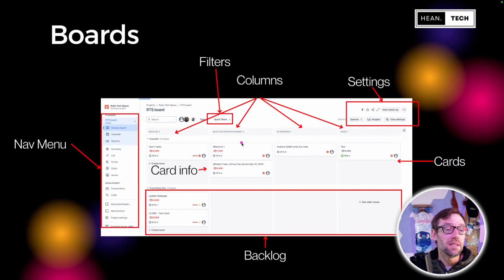Now, depending on how my team uses the board, it can be set up for Kanban, which helps us focus our work. And if you all recall from our first session, our team might have a rule: you only get one item in progress. And when I see more than one item, I'm going to go remove one to focus you in on that one thing. And then you can see as your work moves from column to column if there's any challenges.